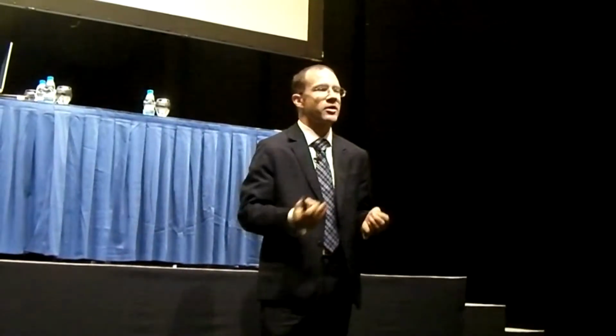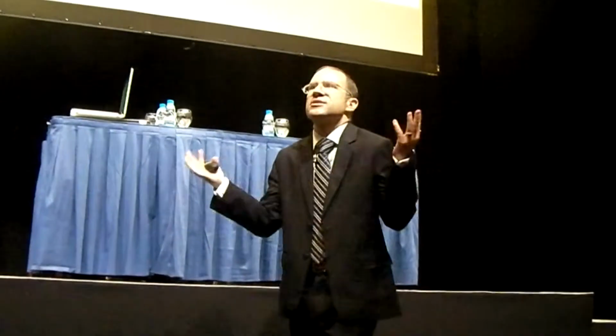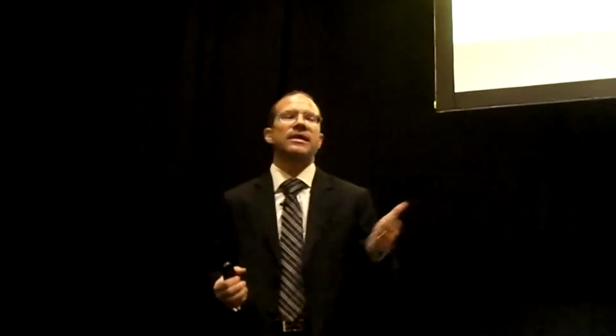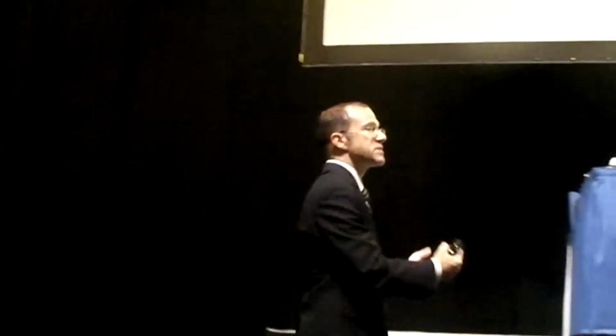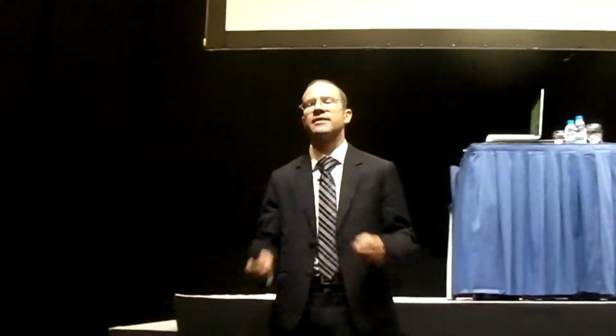During the project, you cannot roll this product out to the end user. You cannot use it in a productive way because it's not validated, hence not allowed to be used. So you will say, so what's then the point of it? If you think about the big advantages of Agile, it's on one side that we can roll out as early as possible and generate value out of something as early as possible, and that's not possible here because we will anyway just roll out completely at the end.